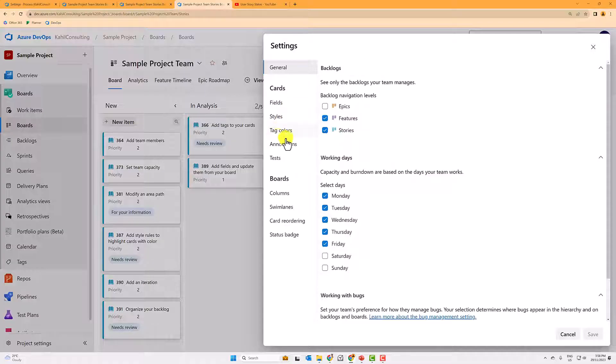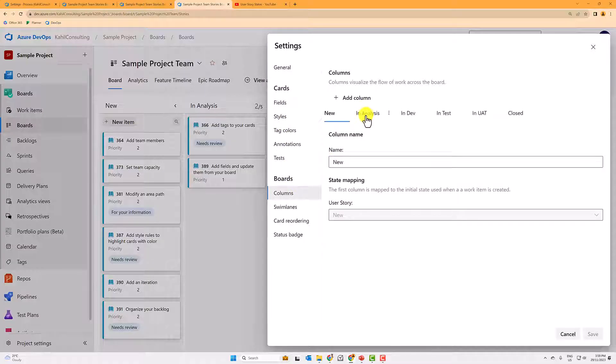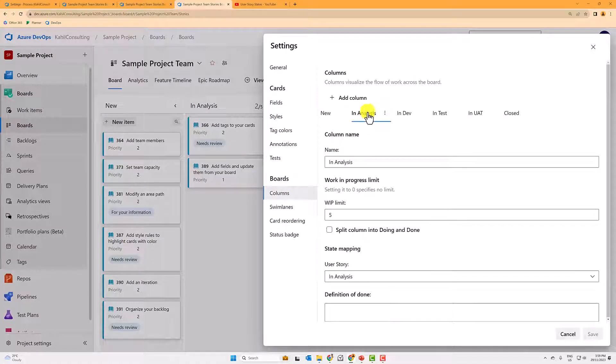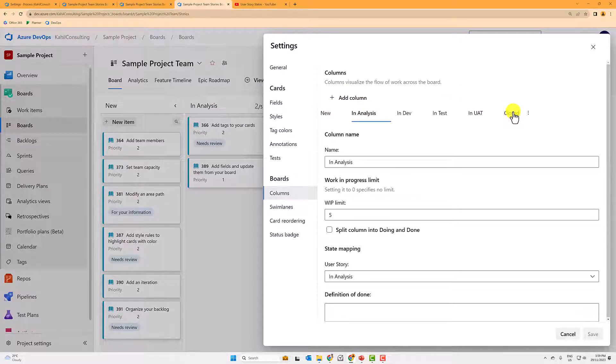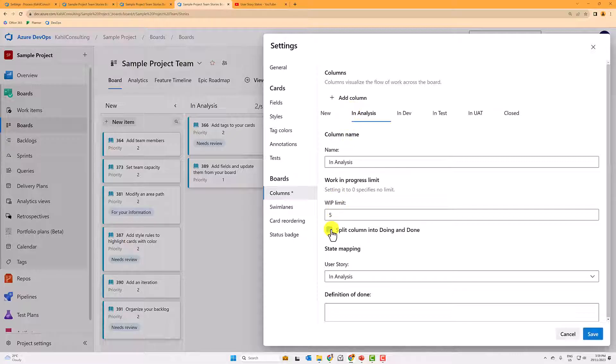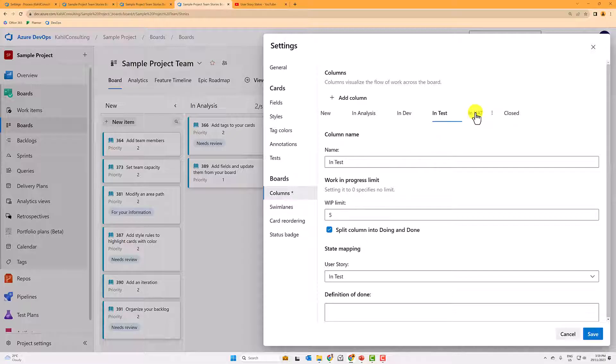So I would go there to the settings, columns, and any of those. So if it's new and closed, you cannot split them because it's either new and it's outside of the in progress state or closed. But anything that is in between, you can split in doing and done. So if I go in analysis, I split it, in dev, I split it, in test, I split it, and in UAT, I split it.